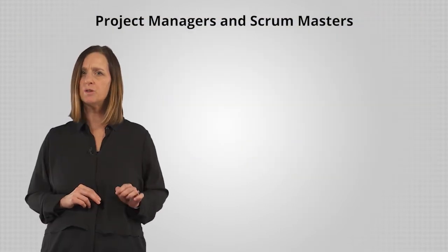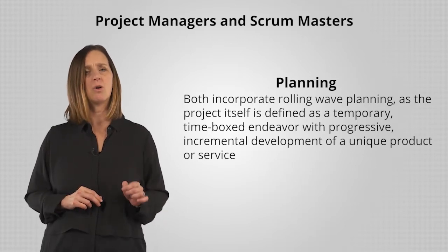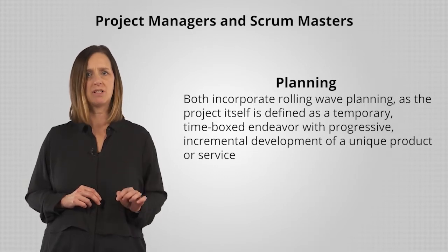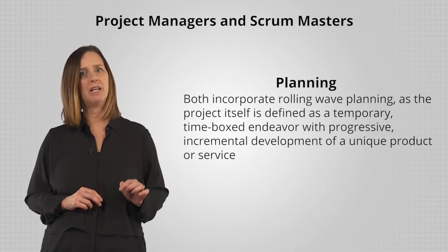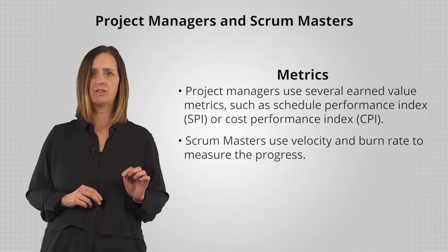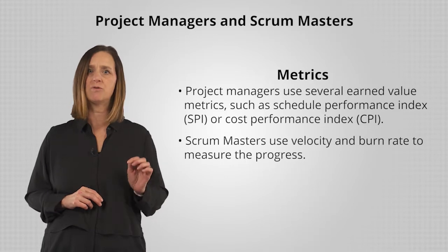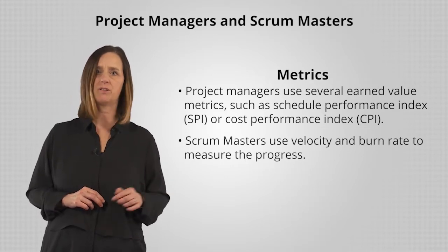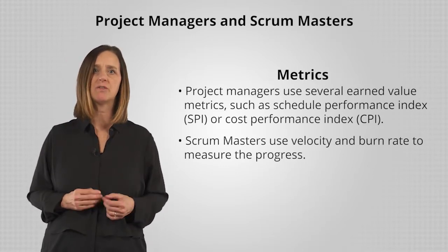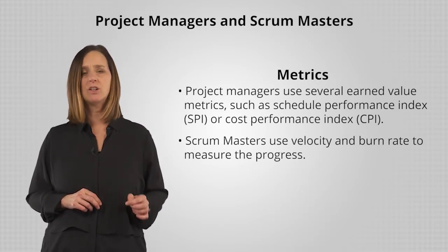This doesn't mean that there are no similarities between a Project Manager and Scrum Master. The principles of project management also incorporate rolling wave planning, as the project itself is defined as a temporary, time-boxed endeavor with progressive incremental development of a unique product or service. The project managers can use several earned value metrics, such as Schedule Performance Index or Cost Performance Index, while Scrum Masters use velocity and burn rate to measure the progress. Both methods can be used in an organization effectively so long as the expectations of the project manager and Scrum Master from the individual, team, and the organizational views are clearly understood.